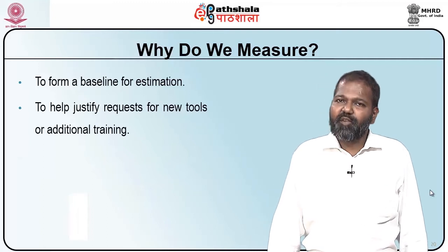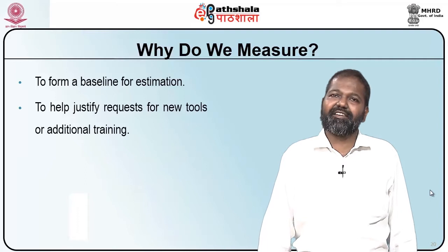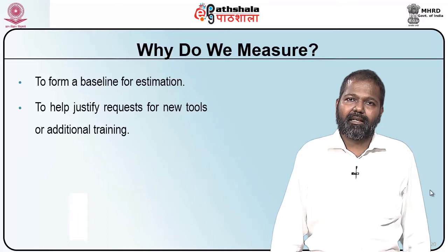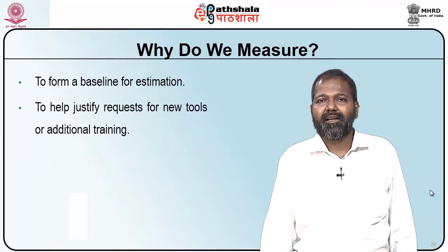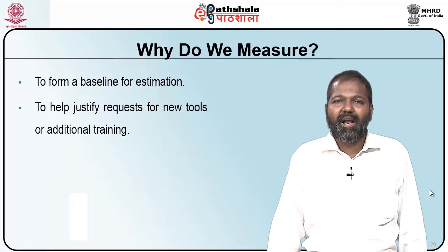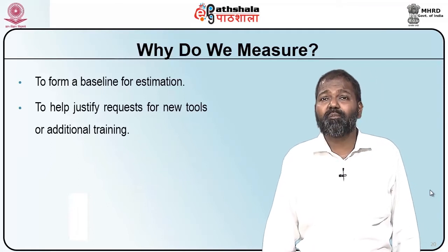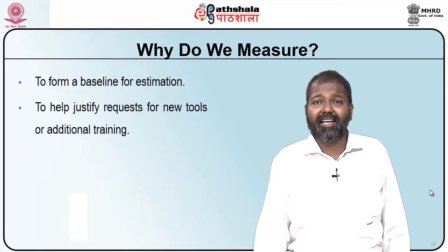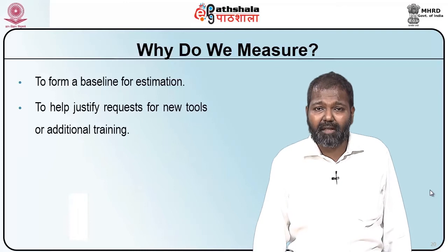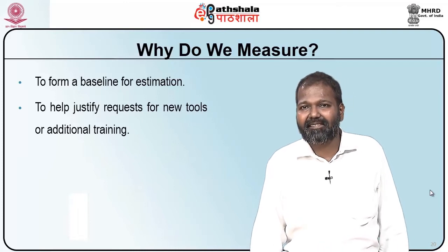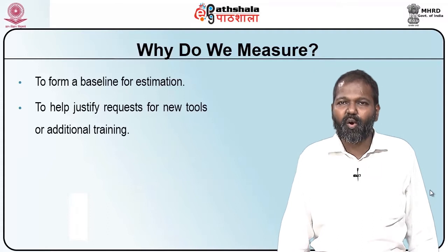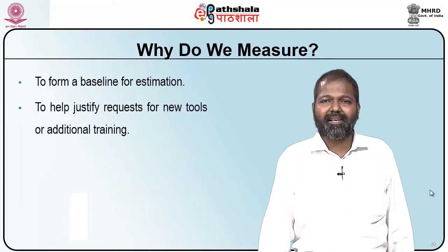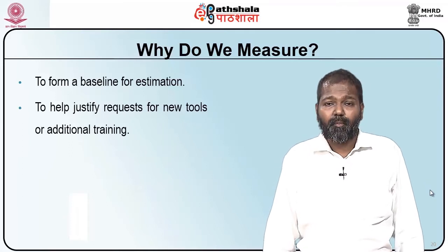When a software project is initiated, you start with a feasibility study, where we talk about technical feasibility, economical feasibility and operational feasibility. Here too we use measurements. Only if the outcome of the feasibility study is yes can you go ahead with the project. Otherwise, you may not go ahead with the project. This is common for both software projects and other infrastructure projects.